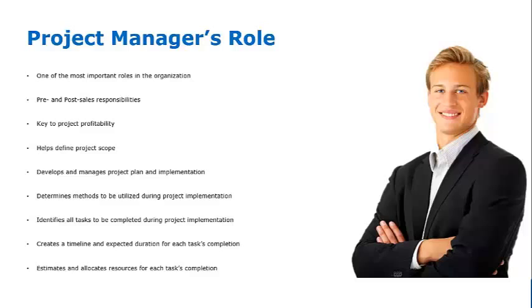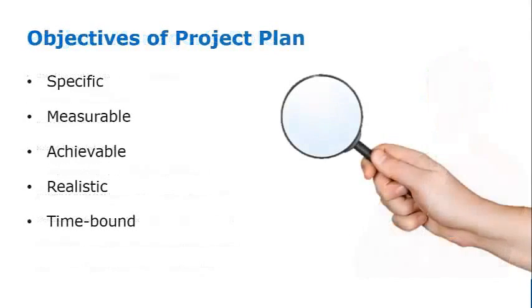They develop and manage the project plan itself and the implementation. They determine the methods to be utilized during project implementation and identify all tasks to be completed during the project's implementation. They also create a timeline and expected duration for each task's completion, and they estimate and allocate resources for each task's completion. The objectives of your project plan mirror the SMART acronym. They need to be specific, measurable, achievable, realistic, and time-bound.